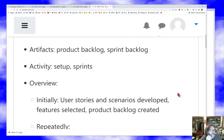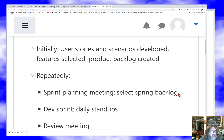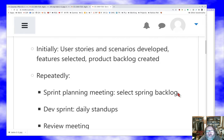What does the activity cycle look like? We do a little bit of setup — hopefully as little as possible. The goal is to keep things simple and quick, and then we start doing what are called sprints, which are little timed sections of work done one after the other. The setup is that when we start we gather user stories and scenarios, select what features our product will have to meet those, and then we create what's called the product backlog — the list of things we need to do early on.